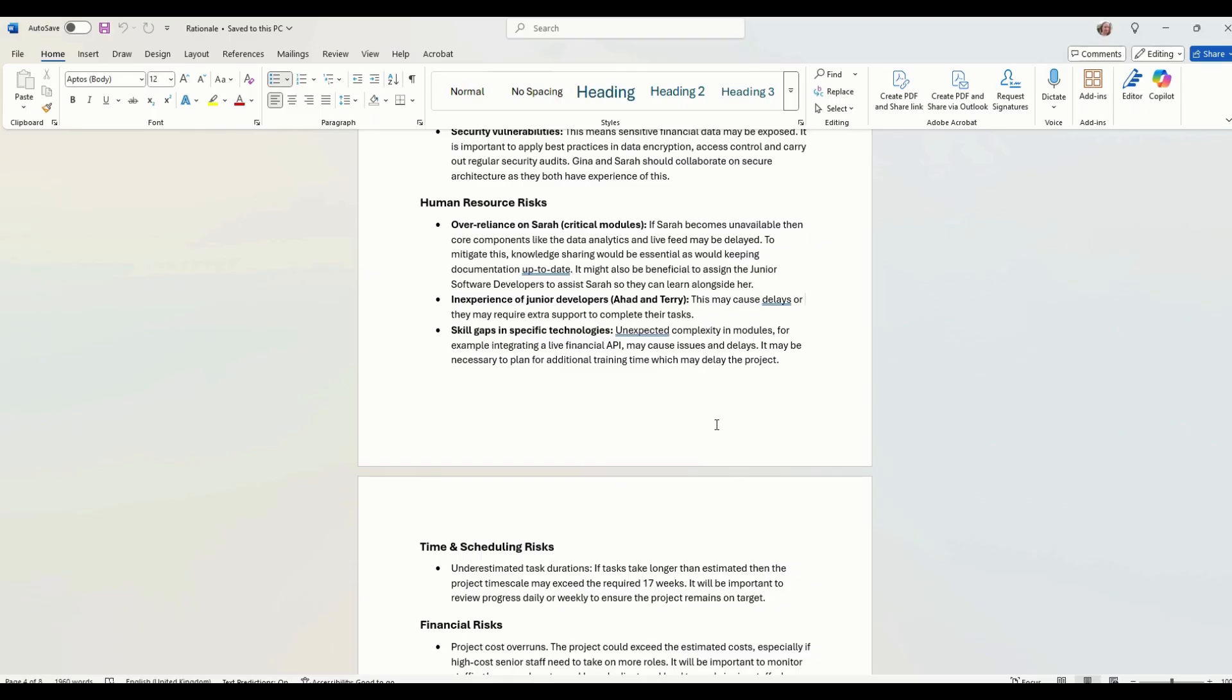It might be beneficial to assign junior software developers to assist Sarah so they can learn alongside her. So if she does have to take a day off, maybe they can take over. But again, that's going to affect your project costing. So we're not actually going to put that in at the moment.